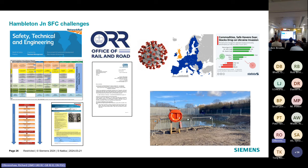So we had to have what we call a rail reliability study. We had to satisfy the chief engineer in Network Rail that we were ready for the market, ready for Network Rail. It's a system assessed against 6 criteria, and we needed that as a stage gate between Group 3 and 4. So back in 2017, we presented to the chief engineer in Milton Keynes. Product acceptance went throughout the project from Group 3 onwards, really, when we had the requirements set out to us.